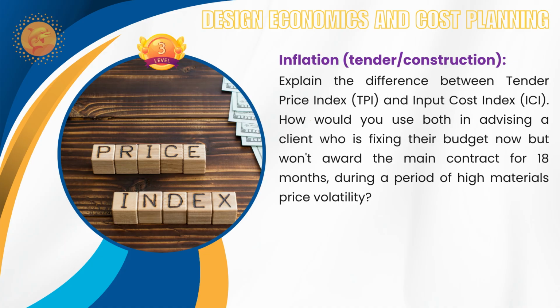How are they pricing? They are putting in more markup, more contingency or risk allowances based on the type of client, the employer to whom they are submitting the bid. So this kind of information is important. How they tend to submit the tender bid comes under the tender price index.